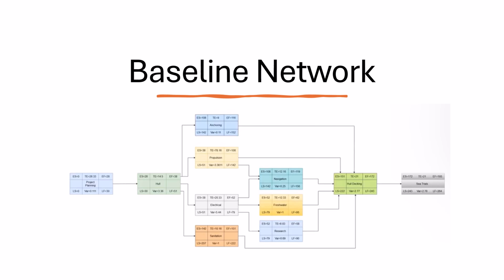This is a graphic of the baseline network with given potential start and end time frames for each of the subsystems for the project. This would later be manipulated according to the amount of slack available per subsystem in order to smooth out the resource demand.